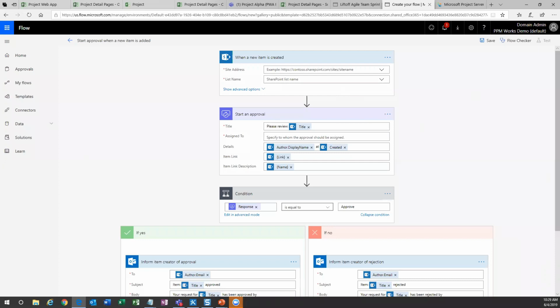Now, within the Project Online space and in Teams, there are built-in places where data can be captured. Specifically, I'm talking about the issues and risks list in Project Online. Really great built-in tool. If you're using project sites for your projects, then you already have the built-in issues and risks lists so that project managers and team members can log those issues and risks on projects. Because they're on the project site, they are reportable because they are associated with the project UID. So Power BI allows that automatic reporting.